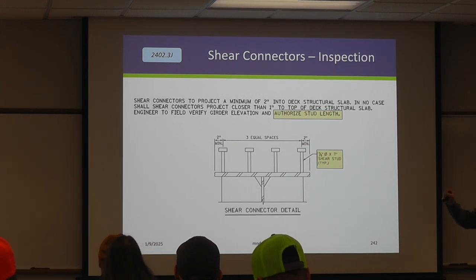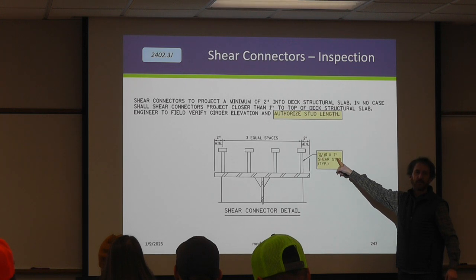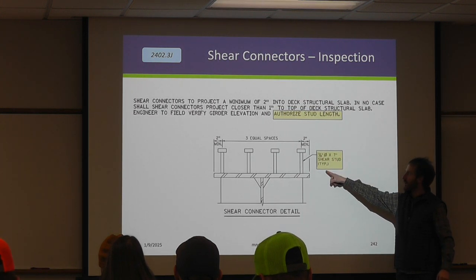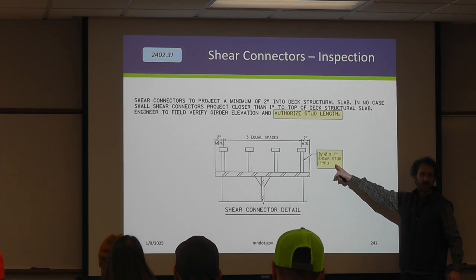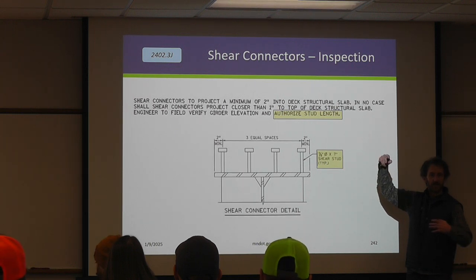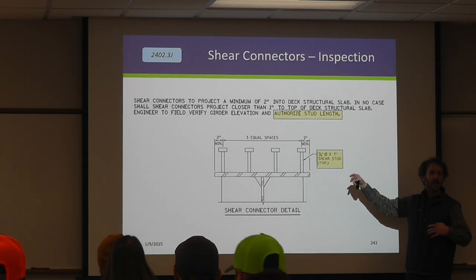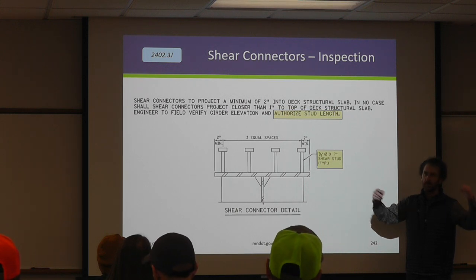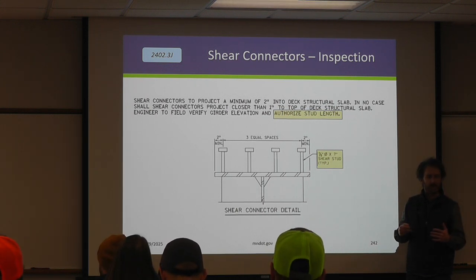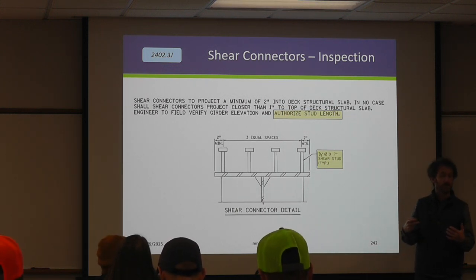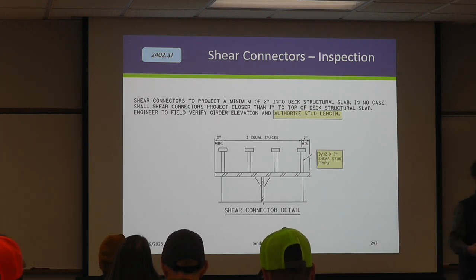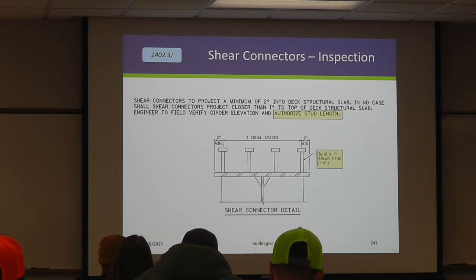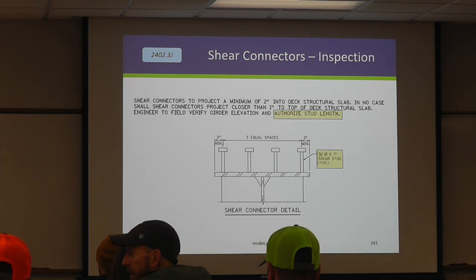And so even though this will recommend a height in the plan, so if you dig through your plan, you'll find this exact image where it's calling for a 7/8 by 7-inch tall stud. This can vary, right? We have a tolerance for our stool heights. The beams may deflect a little bit different than they were designed. So it's important to get the stool shots done. If the contractor goes and orders all of their studs anyway based on this, they're liable to potentially have to change that.